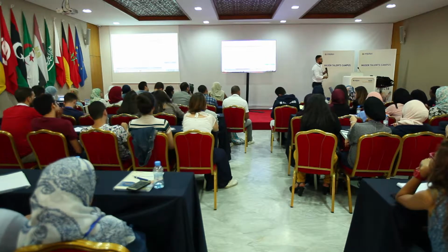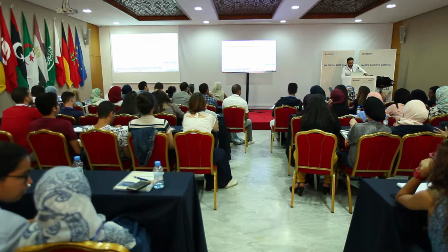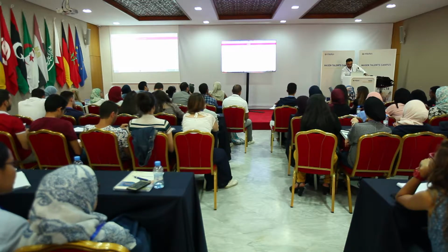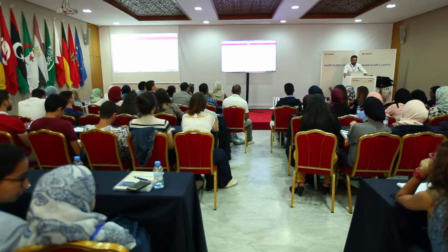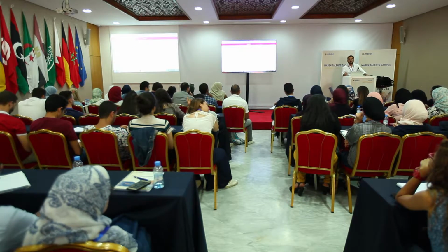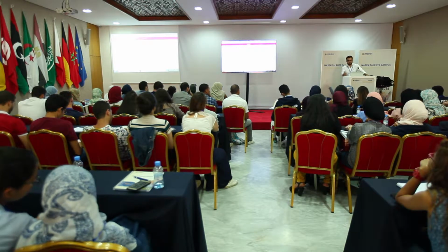Nowadays it's lower, it's reduced this time, but even today it could take 6 months to a year to secure the other financing. Because if you're talking about a 600 million project and you only have 20%, you need to go out to the banks telling them, look, we have a contract with Masen for 25 years. We come in with, I don't know, 120 million. We want a loan from you.